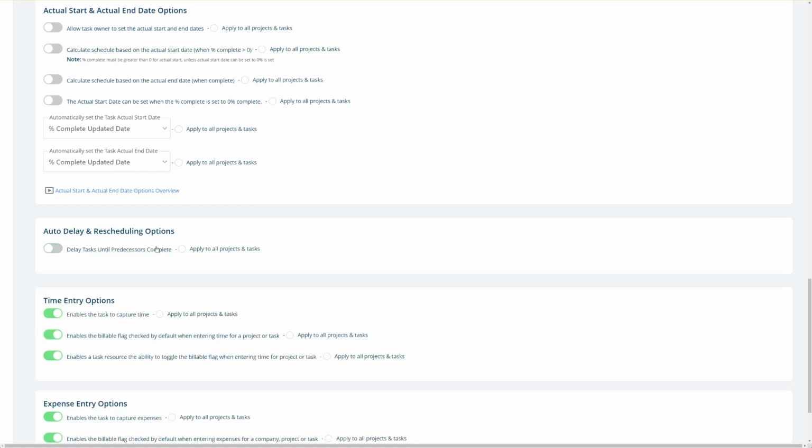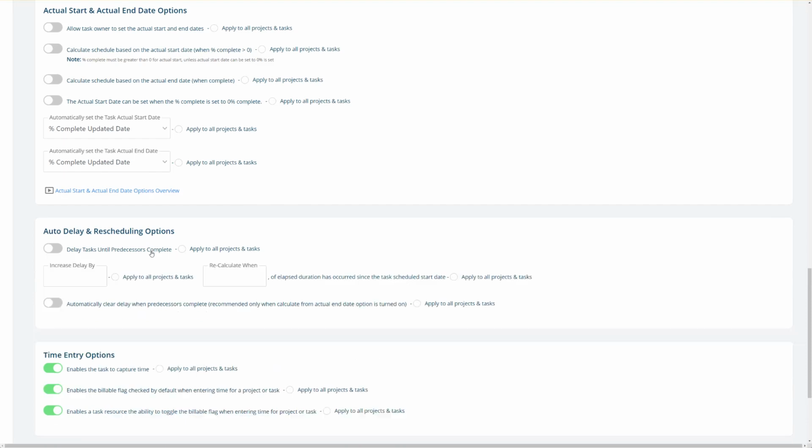Normally, you wouldn't have this on. You would only have this on for specific tasks like a milestone, or if you're waiting for a client to give you something that needs to be input. That's when this comes in handy. Most clients don't use this very often, except for those special situations, although we have a handful of clients that put this on for every single task. And that's what these checkboxes will do: push these settings down globally.